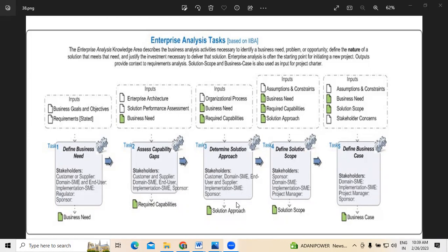If you want to define a business case for any project, first you need to understand the current business situation. You need to understand the problems which were there in it. Next, you need to know about the importance of addressing the problem. Followed by this, you must know about the scope, followed by the beneficiaries.